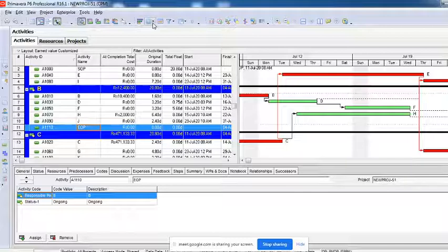I will be able to know what we thought you should do and what you have done. Both can be reviewed against each other based upon these things. I can create the codes, give assignments of the work, and then put on those particular columns to see what you have done. The moment you fill your timesheet saying you have worked 52 hours this particular week, it will automatically come here and get added as actual work. You have to give a justification if it is not done as planned, or if you have done more, then you will also have to take more responsibility in the next week. So that's how it works.